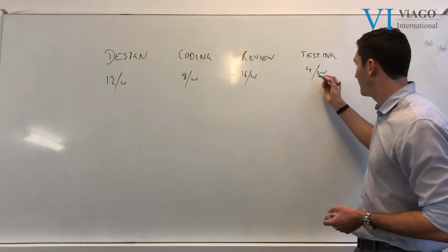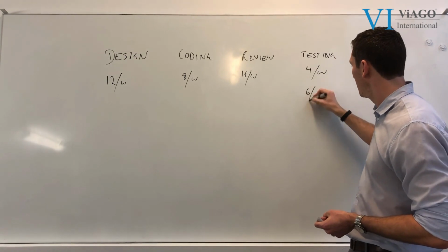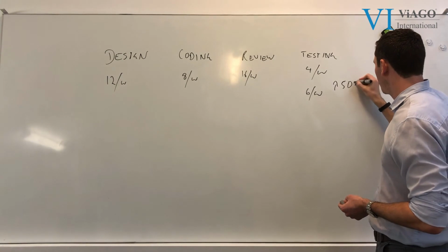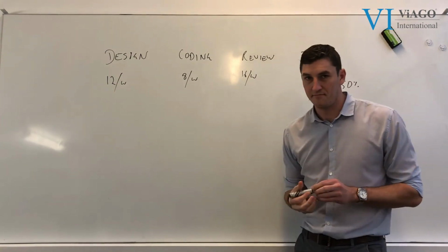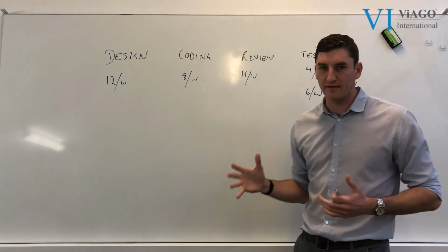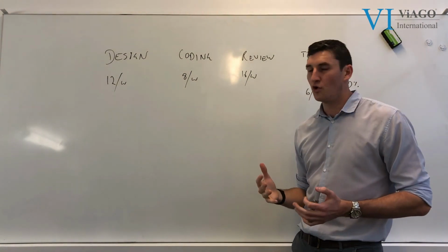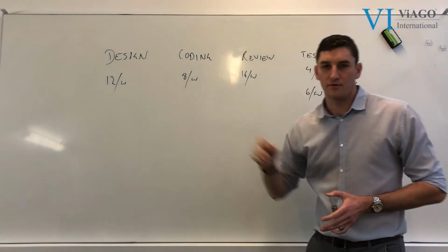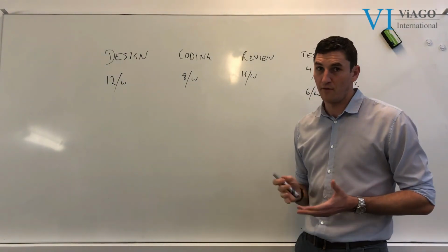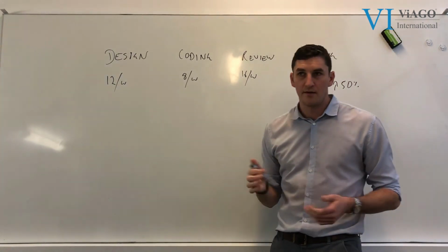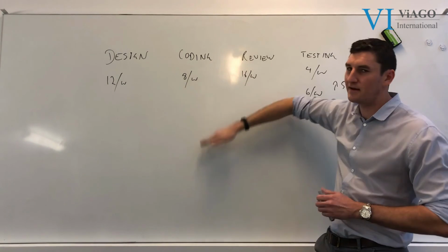Because if you increase that from 4 to 6 a week, then you're going to get 50% more productivity in this team, just from that one step. So there's a lot of focus on, we just want everything to go better. Sure, but you're going to get the most benefit if it's coming out of whatever is constraining as the bottleneck of your processes. Let's say if it was coding, you should put the effort into coding. So you can look at the backlog.